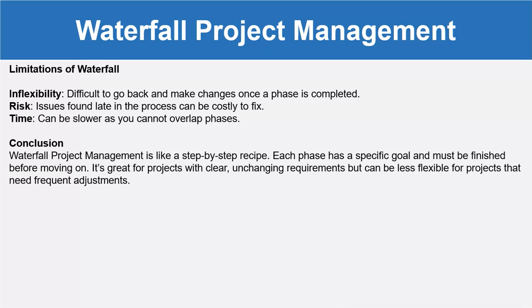The limitations of waterfall are: we cannot go back and make changes once a phase is completed, as it is strictly sequential. Issues found late in the process can be costly to fix, and it can be slower since you cannot overlap phases. In summary, waterfall project management is like a step-by-step recipe — each phase has a specific goal and must be finished before moving on. It's great for projects with clear, unchanging requirements, but can be less flexible for projects that need frequent adjustments.